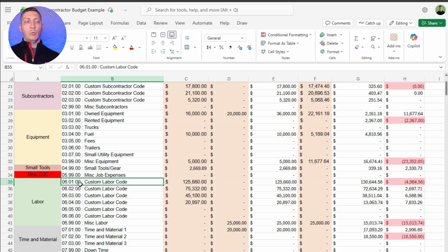So what that looks like is if I'm running sewer and water at the same time, and I know that they're going similar by each other, they're just different layers and things, I'll combine those two, and I'll set, hey, from manhole A to B, this 500 foot is both of these combined because it's going to take about a month.